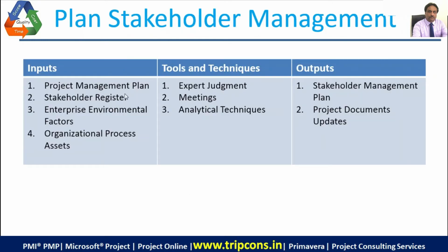So plan stakeholder management inputs are the project management plan, then your stakeholder register, enterprise environmental factors, organizational process assets. Tools and techniques would be expert judgment, then meetings, then analytical techniques, and the outputs would be your stakeholder management plan and the project documents updates.